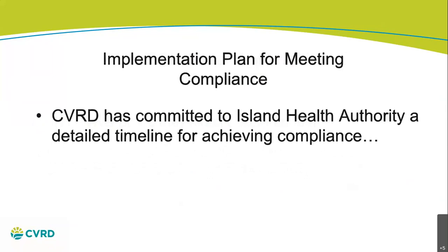So in the recent order that we got from Island Health, a detailed timeline was included, and there are steps along the way. They recognize that we have to get consent of the community for borrowing. It has to go through a number of steps to do that, and then needs approval of the provincial government in order to proceed. And so they've allowed for that in our process, in our timeline.